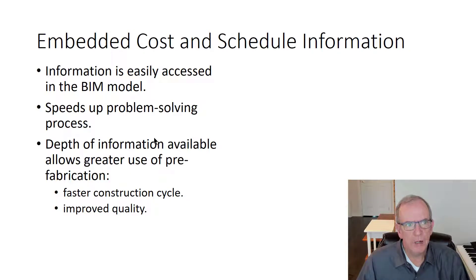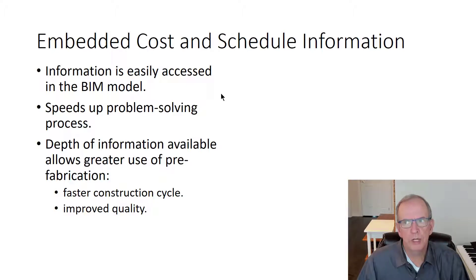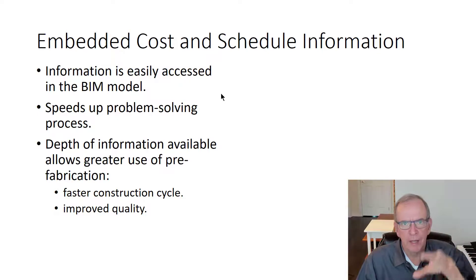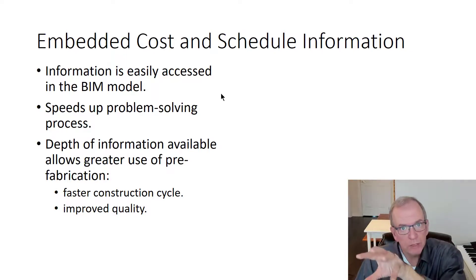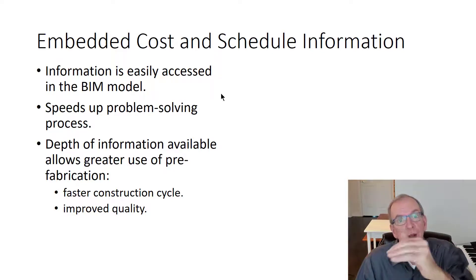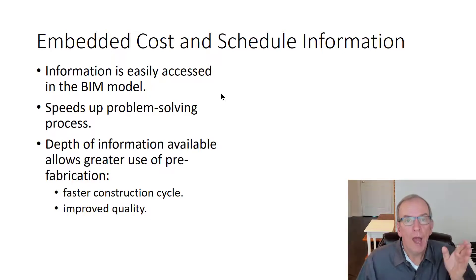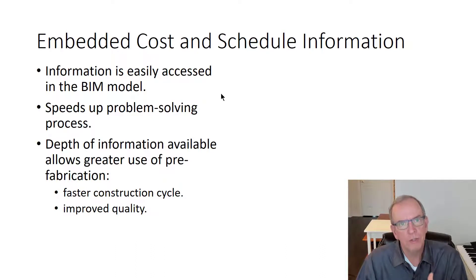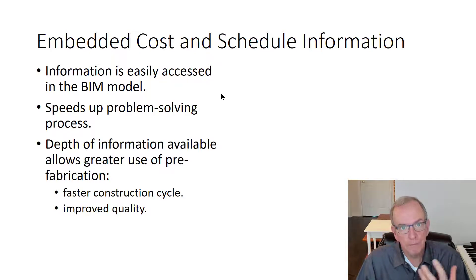BIM includes the embedment of cost and schedule information. In the previous lecture I did an example in Microsoft Project of a new township project, showing how costs are added and how that builds a cost-loaded schedule. With BIM, we can take all that work from Microsoft Project and integrate it into the BIM model so that we can actually animate it on a timeline. We can see how the building is being constructed and analyze it for constructability and the effectiveness of our site layout.